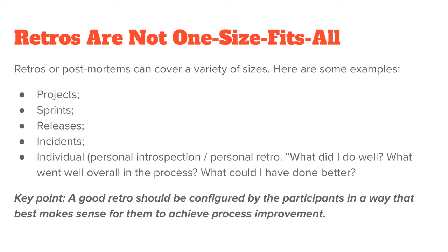There's never a conversation about who caused it. The root cause comes the following day, as does the major incident retrospective. So every day we have a major incident retrospective to go over any major incidents that happened the day before. So we're still doing retros in that case daily for those things.